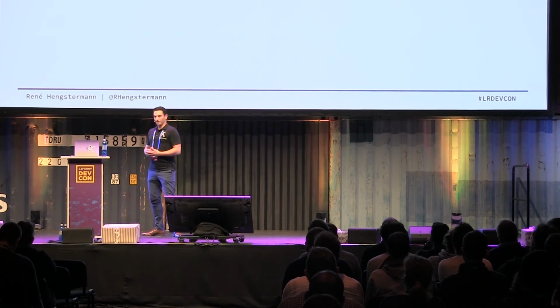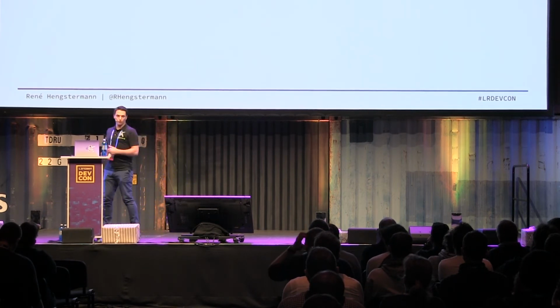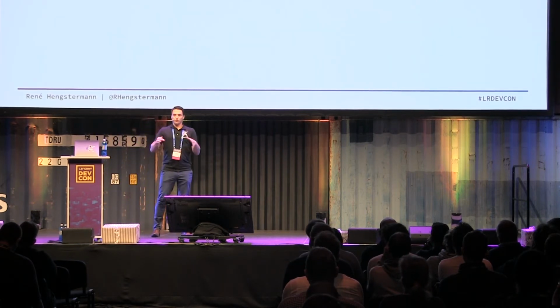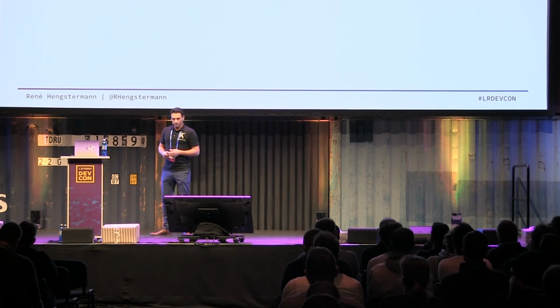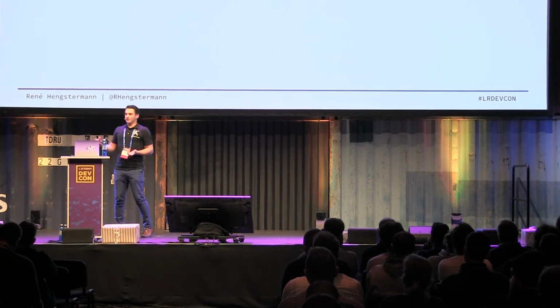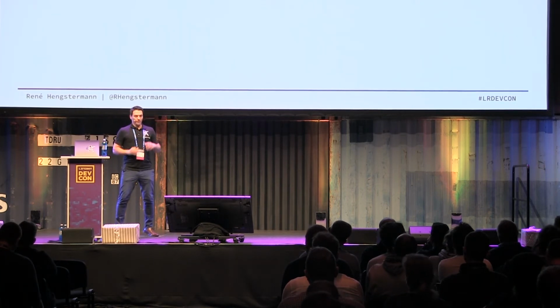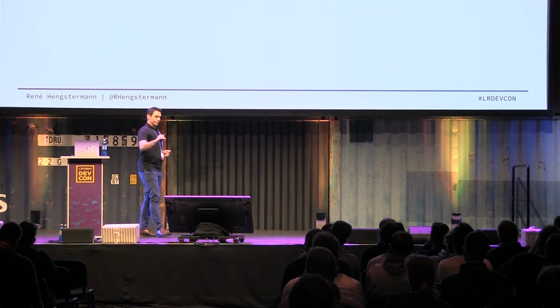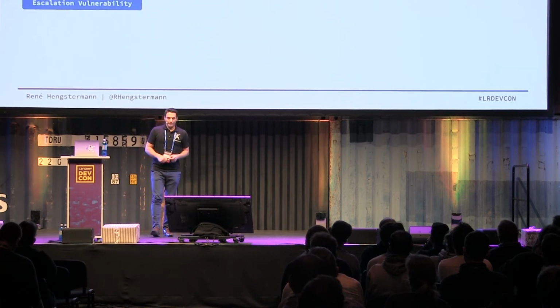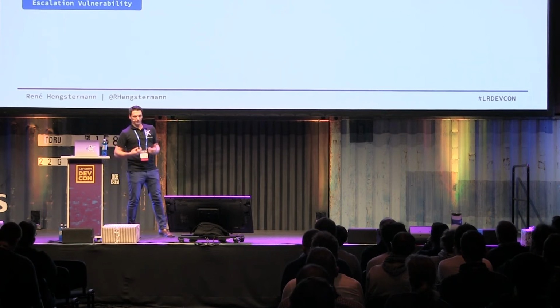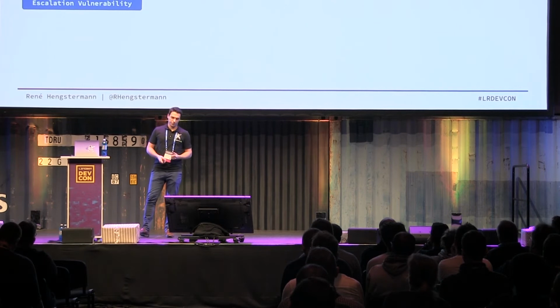One team was focused on 7.1, so we did the Liferay 7.1 proof of concept to check what's needed and how complex the integration is, and most of the team was really working on pushing features towards the productive environment. In the next sprint, we did the actual migration, so we migrated all our modules, the themes and everything around to 7.1, but the smaller part of the team was still pushing features. And then we went live with this platform. So what we can see here is, again, we set up a different system, and it was really quick and easy to work on different work streams.